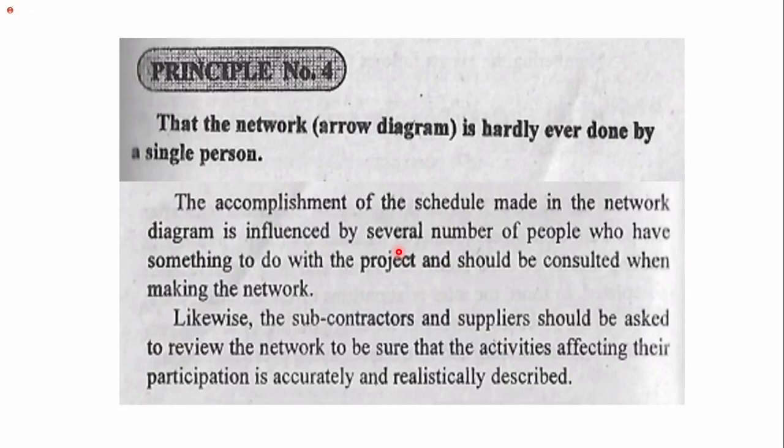Accomplishment of schedule made in the network diagram is influenced by several people who have something to do with the project and should be consulted when making the network. So, the subcontractors, asa man nila to ma-apply sa scheduling nila. Subcontractors and suppliers should be asked to review the network.